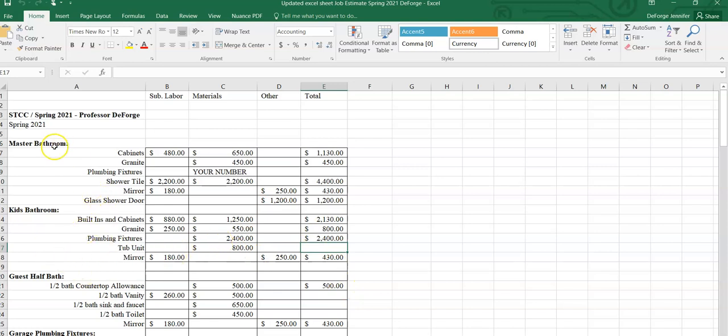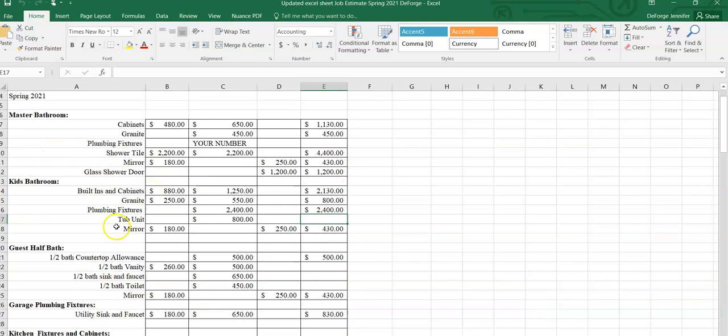Typically what I'll do is I'll break down the specific bathrooms and kitchens, because those are really critical to get our costs completely accurate so we don't lose money. These are the big money makers, right? When we're selling houses as well too. So being able to understand costs associated with each individual room is really important for you to cover your costs. I see that I have a couple lines right here that are not carried over. So again, what you want to do is take these 3 columns and add them all up in your total sum column. Very easy to do.